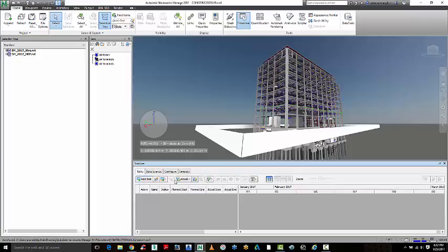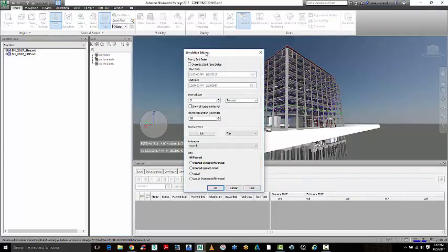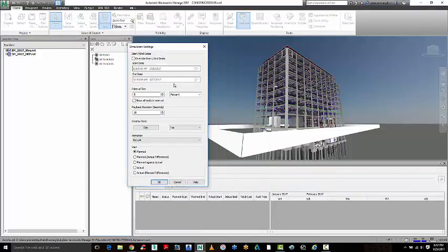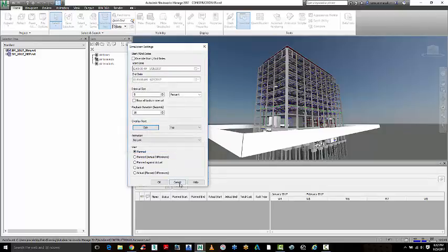And you can set this up to auto-attach to the geometry of the building and then run a construction simulation. And with that construction simulation, you can start to look at the different dates and times things start and finish. You can also add more information about date and time, costs, extras as needed to see how your construction program is progressing in a 3D environment.